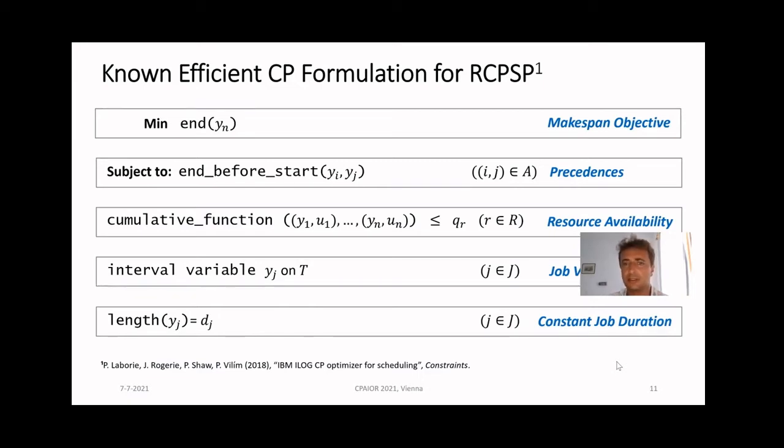Based on this formulation, we derived a first formulation for our learning-based RCPSP, and we added the 2 implications that if the precedence is respected, then the time that the successor job takes is reduced. And if not, then the original duration is used.